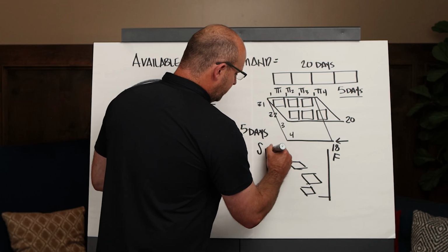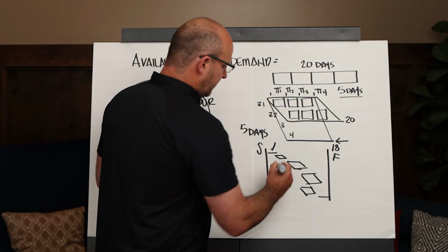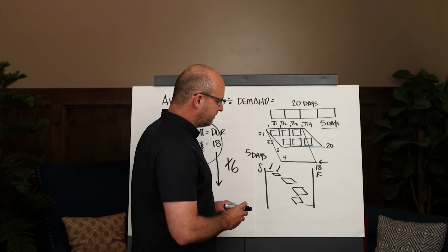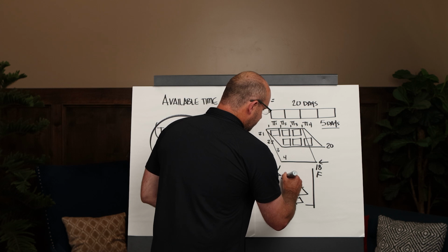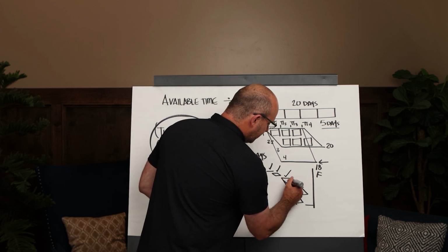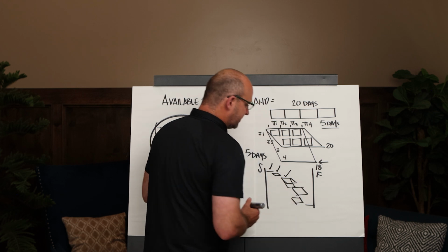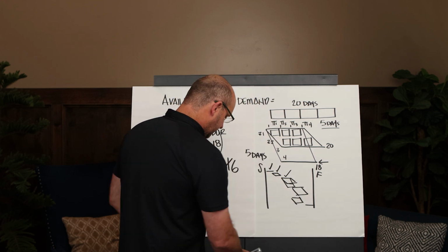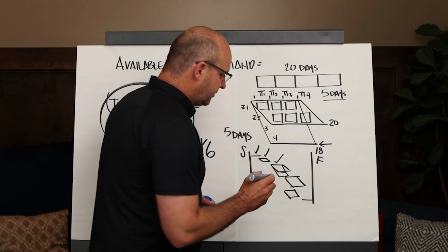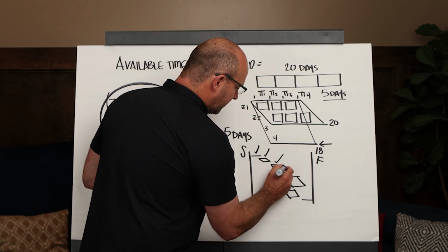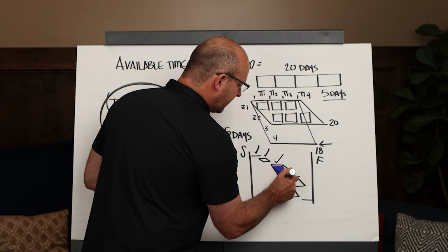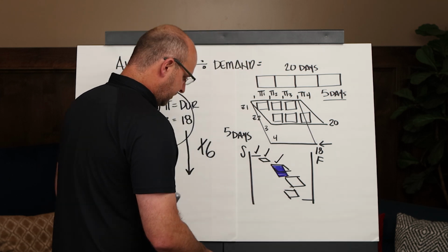Let's say that the mobilization is pretty consistent. Let's say the foundations, it's based on the placement breaks, can't do much about that. The superstructure, oh yeah, we can do a little bit about that. We can break those up into smaller zones so that can speed up. Actually, let me change my marker color here. I'll draw that in a different color. I'll just highlight the center. Instead of it taking longer, it takes shorter because we're analyzing how that could piece together.